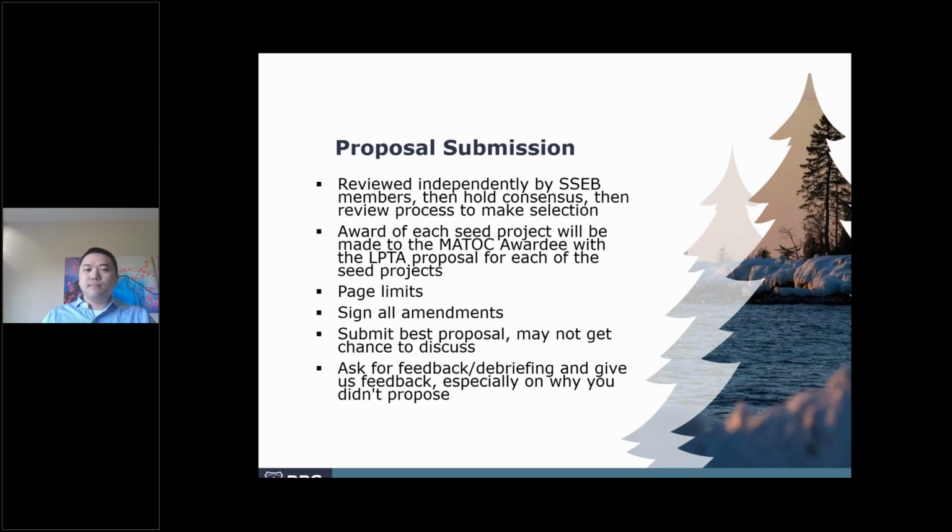And so moving on to the seed projects. This initial phase is to identify our top candidates, right? And then for those awardees, we're going to look at their seed projects, and we're going to see which proposals are technically acceptable, and then from there, who's the lowest price for the seed projects, and that determines the seed project winners.